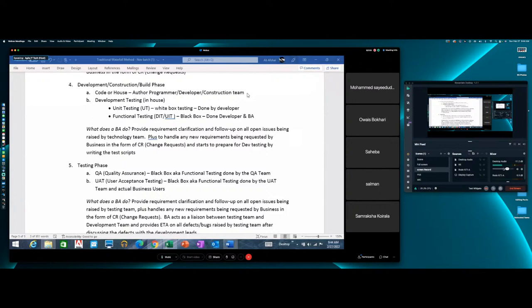Once the basement has been unit tested, the BA may come and look at the basement and validate the basement, right? And then the team will start putting the frame up. Once the frame is up, BA will come in again and start to look at the frame. And then when you start putting the roof on, that's another unit. You will test the unit of the roof, right? The plumbing, the electrical, the HVAC, that's way down the road. You understand? So not every unit will be delivered to you at the same time. For example, if you were building a mobile app, what's one of the very first functionalities we interface with when it comes to a mobile app?